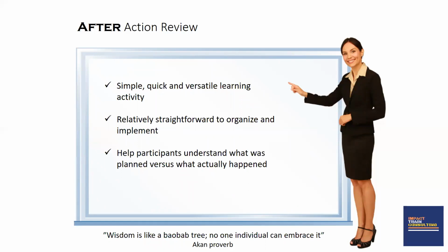After action review is a learning activity that is usually carried out during the transition phase. It is a simple, quick, and versatile learning activity, relatively straightforward to organize and implement, and it helps participants to understand what was planned versus what actually happened. After action review is not a gathering where you go and apportion blames to members of your team, but you're looking at what did we plan, what did we achieve, why did you think it worked, why did you think it didn't work. It's very simple and it's straightforward.